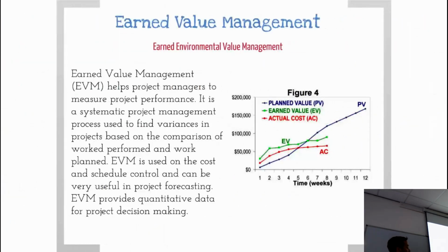Other tools we've got, Earned Value Management is a tool that's used a lot in project management at the moment. It helps project managers to measure project performance, and it tells you in terms of effort versus cost whether or not your project is successful. And there's a lot of stuff going on there now about what we call sustainability earned value management. So trying to use these tools, which were originally used to make financial judgments, to make sustainability judgments. So as the amount of resource we put in to reduce carbon emissions, for instance, is it being successful? Was it a good thing to do?